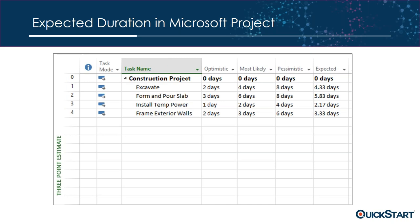In Microsoft Project, you can actually create a three-point estimate view with four columns — optimistic, most likely, pessimistic, and then have Microsoft Project apply the formula automatically to calculate the expected value. So Microsoft Project can help you perform PERT or three-point estimating, though you still have to gather the data and input the information.